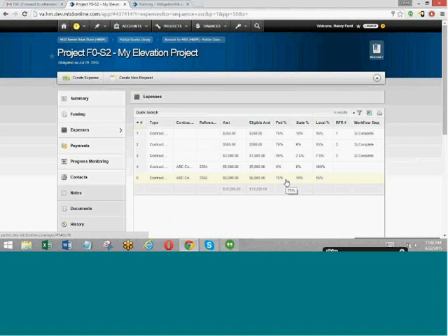So let's say now you're 6 months down the line, you've logged all your expenses, you're ready to submit a reimbursement request to get some payment from VDM. At this point, you have the option to create a reimbursement request, pull in those two expenses, and the system will pull in all the data as well as all the supporting documentation into that reimbursement request with a single click, and then you're ready to submit that request to VDM.